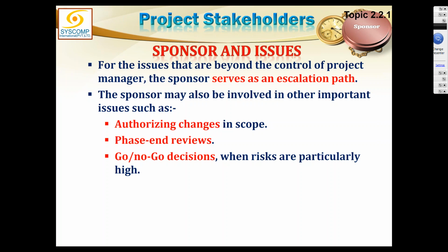If there is some change in the project scope, time or cost, and the project needs to be realigned, the permission for those changes is authorized by the project sponsor, or for that matter, by the project board.